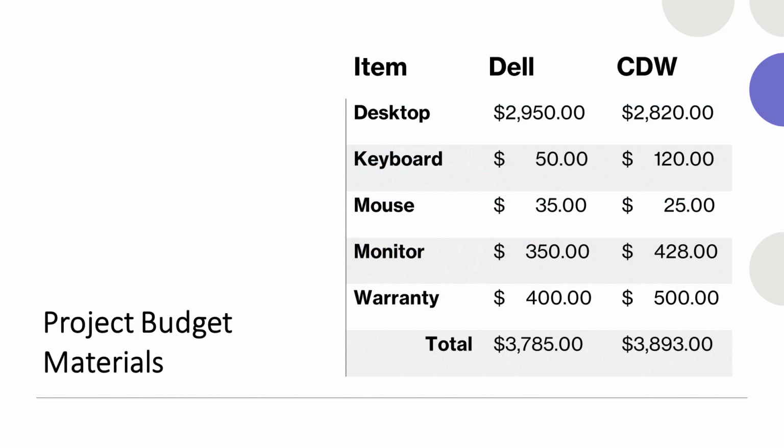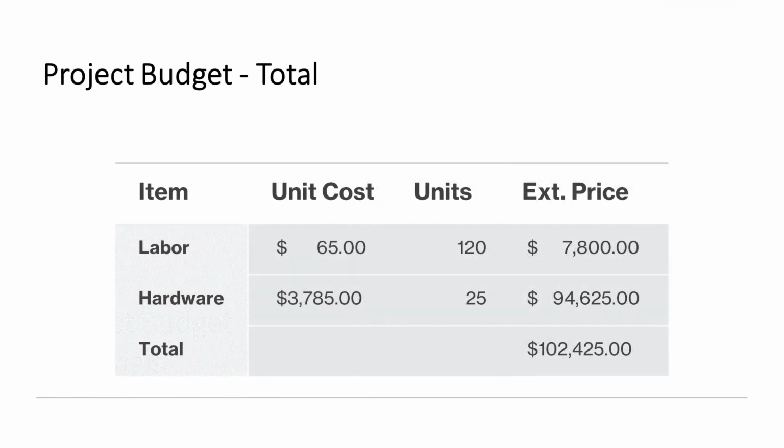To put together a really detailed budget, we've got a couple steps to follow. First, we need to stick with our procurement process and compare quotes from different vendors for what we need. But that's not all. We also have to figure out how much we will spend on the labor. Since we're bringing Alex on board to help us with the technical side of things and to give us advice throughout the planning phase, we need to factor in some charges for hours for his work. This means our budget is not just about the stuff we are buying, it's also about the time and expertise Alex is bringing to the table. Our choice here is Dell.